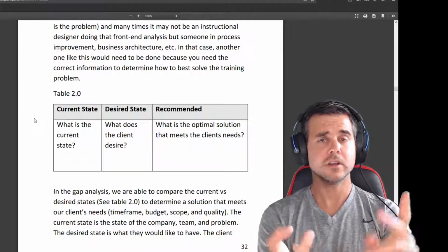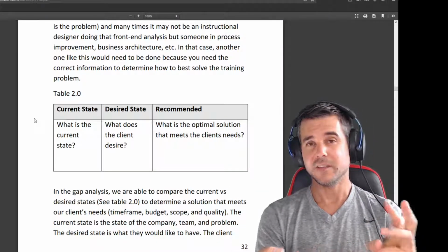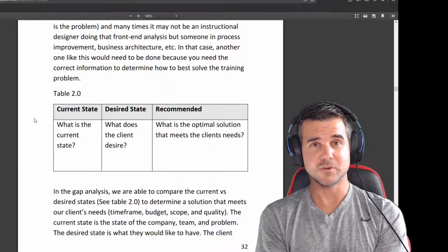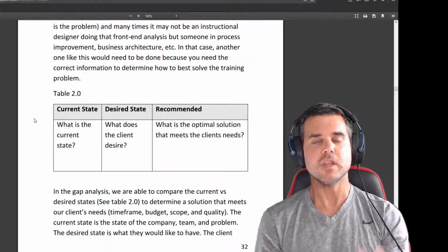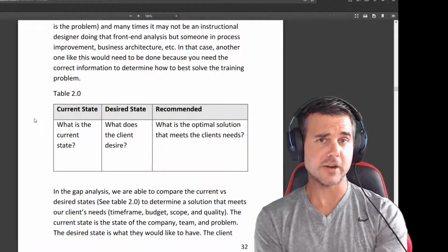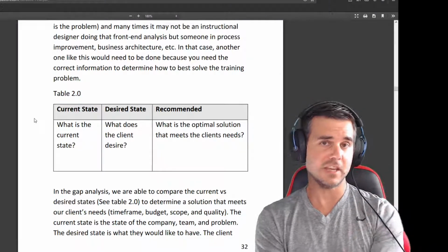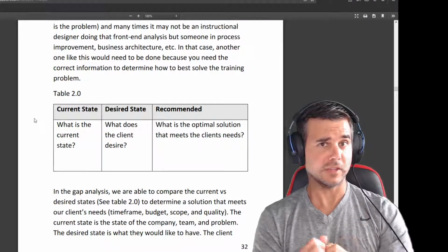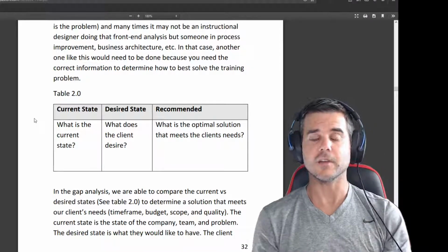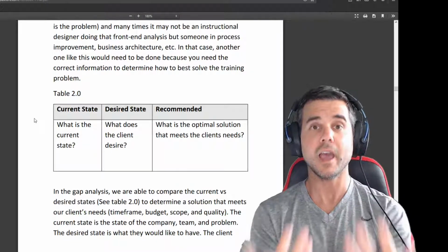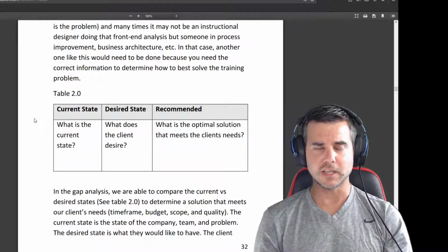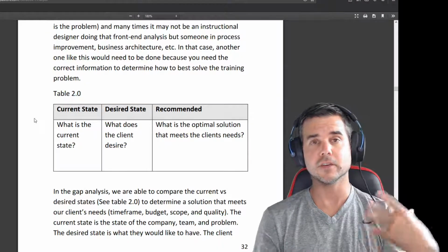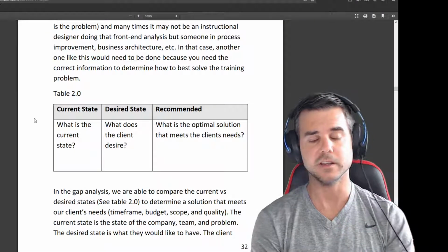Who are the learners? What is the context? Can I get a budget number about what they're looking for? I'm also trying to find out a lot about their technology. What do they want? Do they mention words like narration? Do they mention words like video? Because those are things that increase cost exponentially. So I've got to start to determine what tech they want me to use. If they're thinking e-learning, that probably means video, so I've got to start asking them a few questions about video.